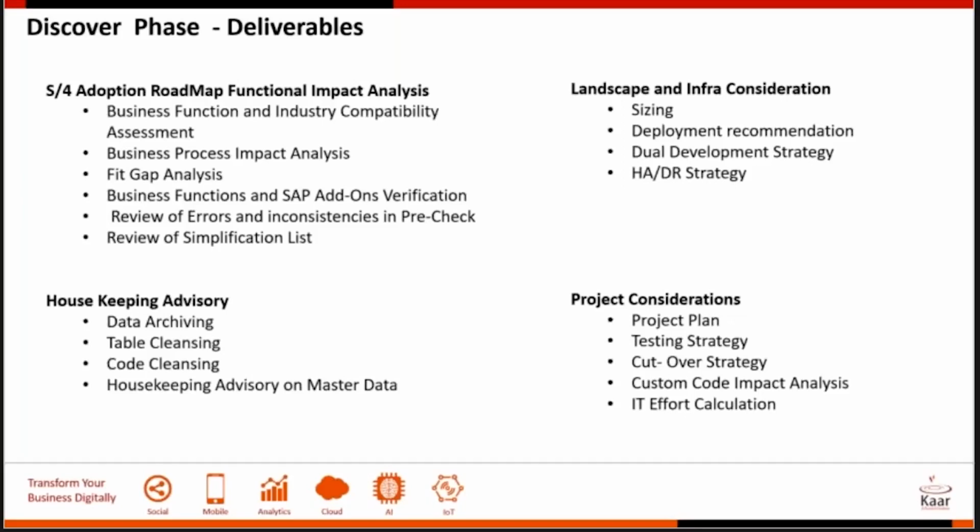And then some housekeeping advisory. How are you going to clean up your code? How are you going to clean up tables like logs, IDocs that you don't need, IDoc logs that you don't need anymore, the spool logs, the batch logs? Even though all of this has jobs that do the cleanup, you'd really want to relook at all this, because when you enter into a conversion, the size of the database really matters. One, for the size of the hardware that you're going to procure, and two, how you go about simplifying your conversion process. And number three, how are you going to manage this going forward?